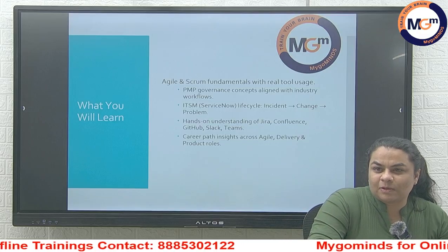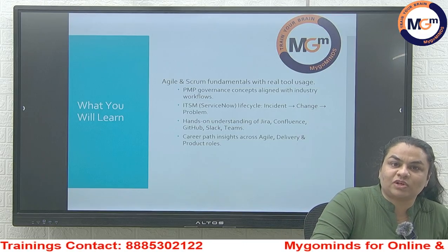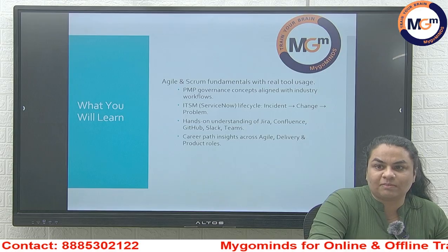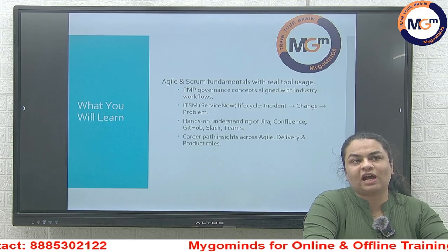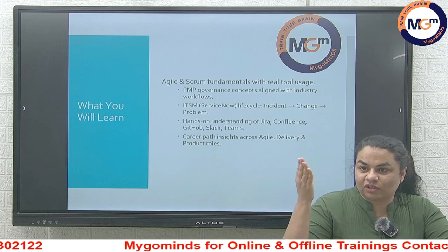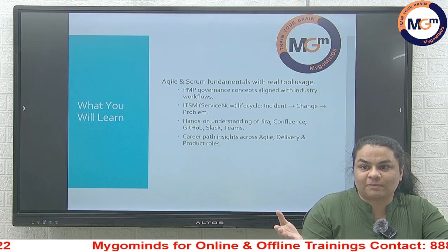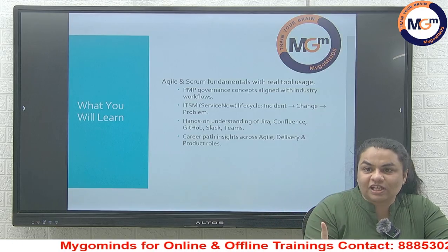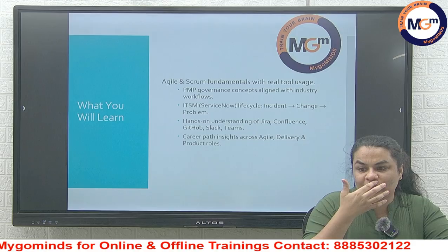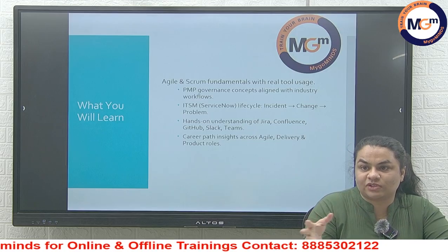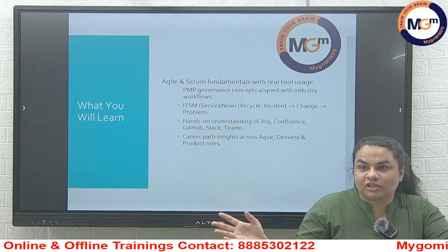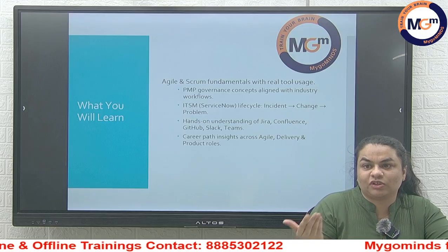Mostly for operational purposes we will use Kanban, and otherwise, for development and any other purpose, we will use Scrum methodologies. For Scrum we have user stories, a lot of to-do lists, a lot of reviews and work in progress, because for a single feature we have multiple developers adding up to the team and multiple user stories assigned to multiple teams. Then it comes to the testing department, then the review department, then production, and then we end the cycle.